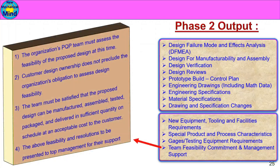Team Feasibility Commitment and Management Support: The organization's APQP team must assess the feasibility of the proposed design. Customer design ownership does not preclude the organization's obligation to assess design feasibility. The team must be satisfied that the proposed design can be manufactured, assembled, tested, packaged, and delivered in sufficient quantity on schedule and at acceptable cost to the customer. The above feasibility and resolutions are to be presented to top management for their support.